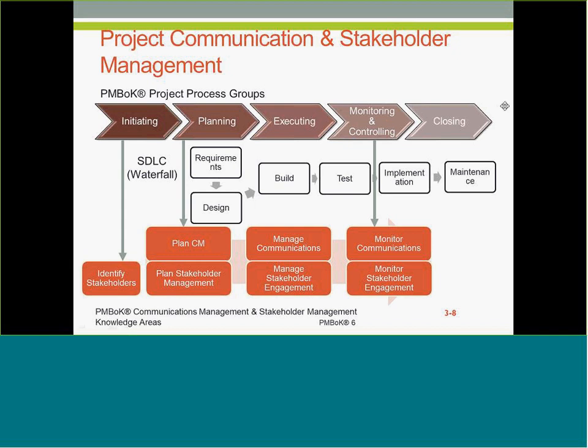So as we have already seen, project communications and identifying stakeholders processes are really a large part of the project management cycle. Our identify stakeholder, plan stakeholder management, manage stakeholder engagement, and monitor stakeholder engagement. The word monitor here is new in PMBOK 6. Processes run alongside our plan communications management, manage communication, and monitor communications management process as well. And that monitor is also new in PMBOK 6. In PMBOK 5 it was control.